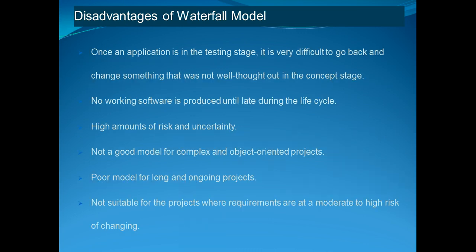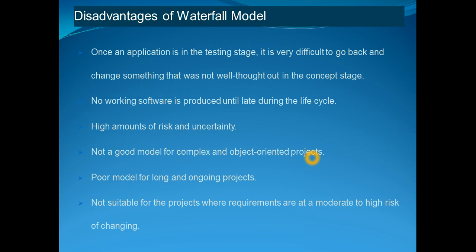There are many disadvantages of the waterfall model as well. Once an application is in the testing stage, it is very difficult to go back and change something that was not well thought out in the conceptual stage. No working software is produced until late in the life cycle. There is a high amount of risk and uncertainty involved. It is not a good model for complex or object-oriented projects, poor for long and ongoing projects, and not suitable for projects where requirements are at a moderate to high level of change.